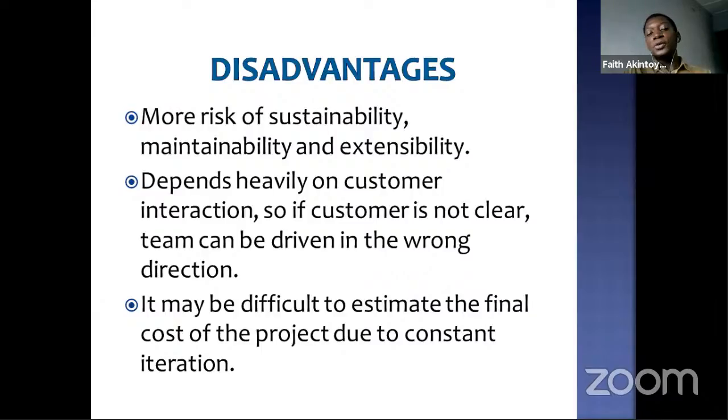And also, it's difficult to estimate the final cost of the project due to its constant iteration, because you don't know how long it will last, or how many processes and phases you have to go through again and again before you reach the final project. Because of that, costs could be quite enormous.